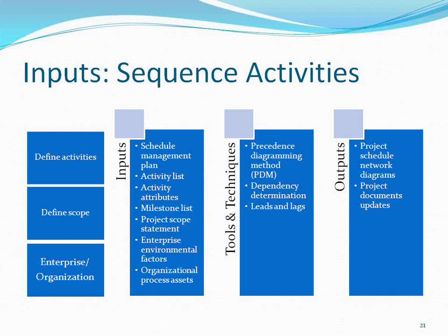Certain dependencies are mandatory. Certain dependencies are left to your discretion. Mandatory dependencies are the dependencies which are very mandatory. Like without getting the plan approval from the municipal corporation, you cannot start your house. You can't start an activity called house construction. So it's a mandatory dependency.